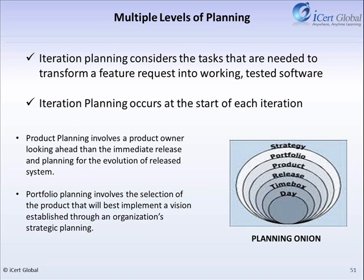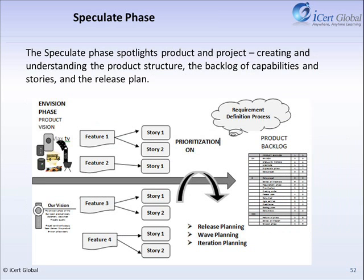Multiple Levels of Planning: planning of Agile projects occurs at multiple levels — namely strategic, release, iteration, and daily — allowing flexibility and adaptability. Iteration planning occurs at the start of each iteration. Product planning involves planning for the evolution of the release system. Portfolio planning involves the selection of the product that will best implement a vision. The Speculate Phase helps in understanding the product structure and the backlog of capabilities.